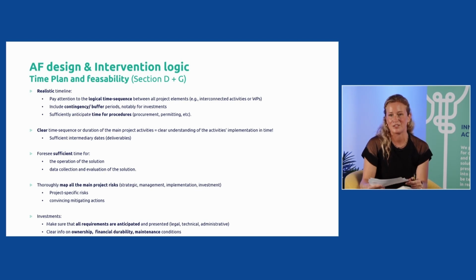And finally, sufficiently anticipate the time for procedures when it's needed. If you need time for procurement procedures, if you need time for permitting procedure, then you need to anticipate them in your work plan, but also to put them clearly so that we can understand that you have effectively taken these permitting procedures into account in your time plan.